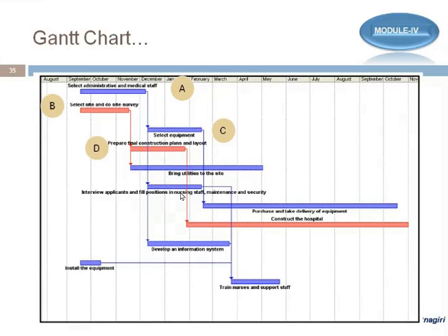If you see that this is the D, now for the D, B is the predecessor, then for the E, again the B is the predecessor. That's why these two activities are done simultaneously. But yes, the time may be different for each activity.